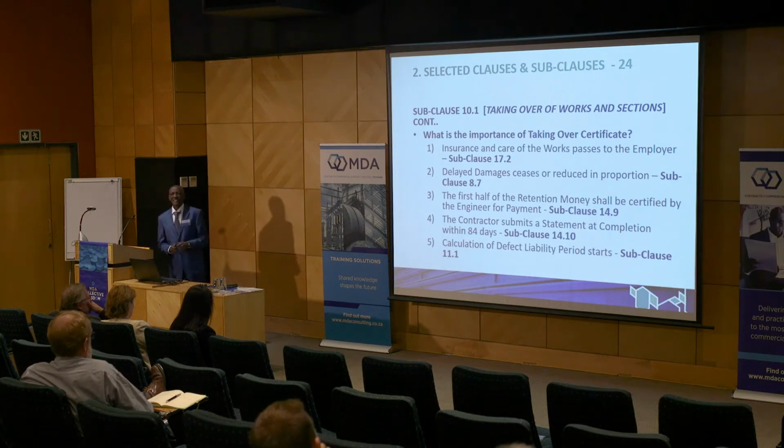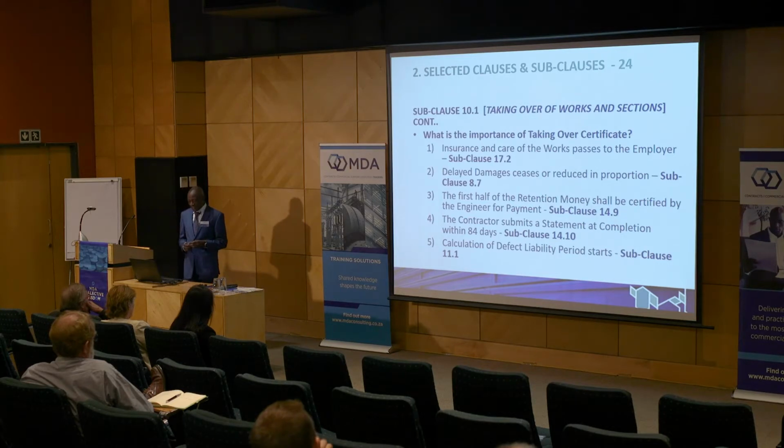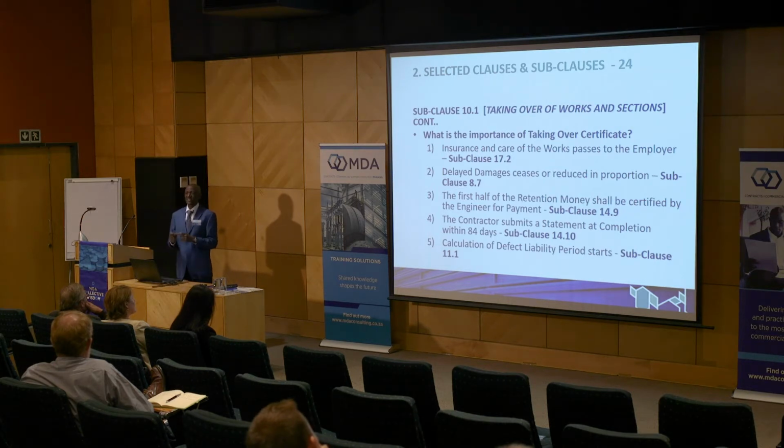It is from this day of the taking over certificate that the defect liability period clock starts kicking. So this is the time the contractor starts serving that defect liability period. So it is important that the contractor is notified timely.